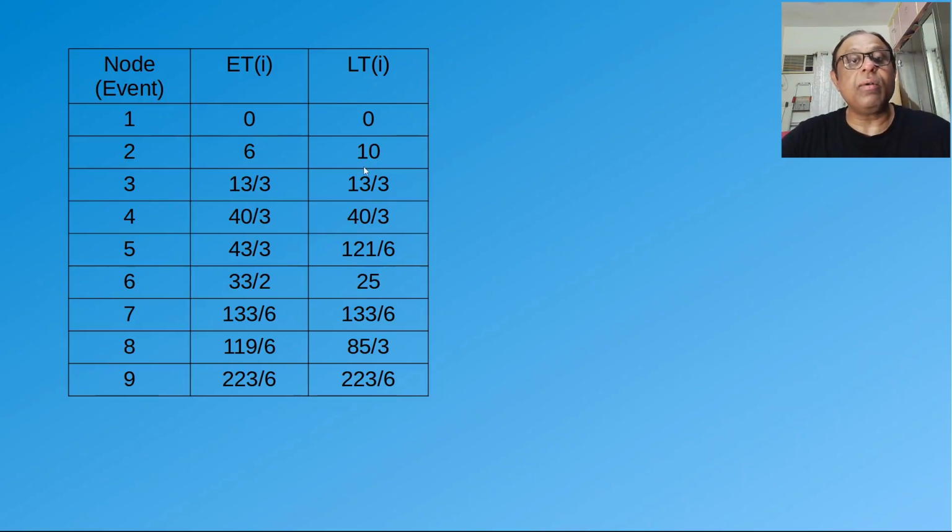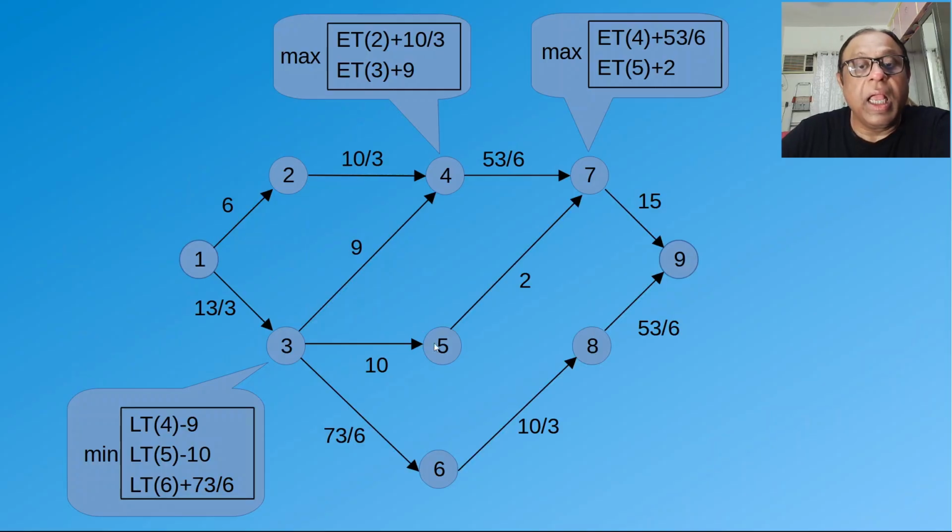Right? Now let us come to late time 3. To come to 3 in the reverse fashion, you have to remember one thing. There are 3 paths coming to 3 now. One is coming 9, 8, 6, 3. The second path is 7, 5, 3. And the third path is, of course, 7, 4, 3, starting from 9. So we have 3 paths which are finally converging at 3.